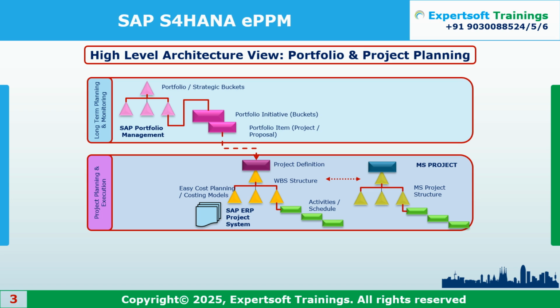These real projects will have further WBSs, like kickstart, preparation phase, realization phase, then go-live phase, like that. Whatever stages you want, you can create further. If you want, you can distribute into networks or network activities. Further, if you want to integrate with MS Projects or Primavera, you can integrate with the PS model, or directly also you can integrate with these items.